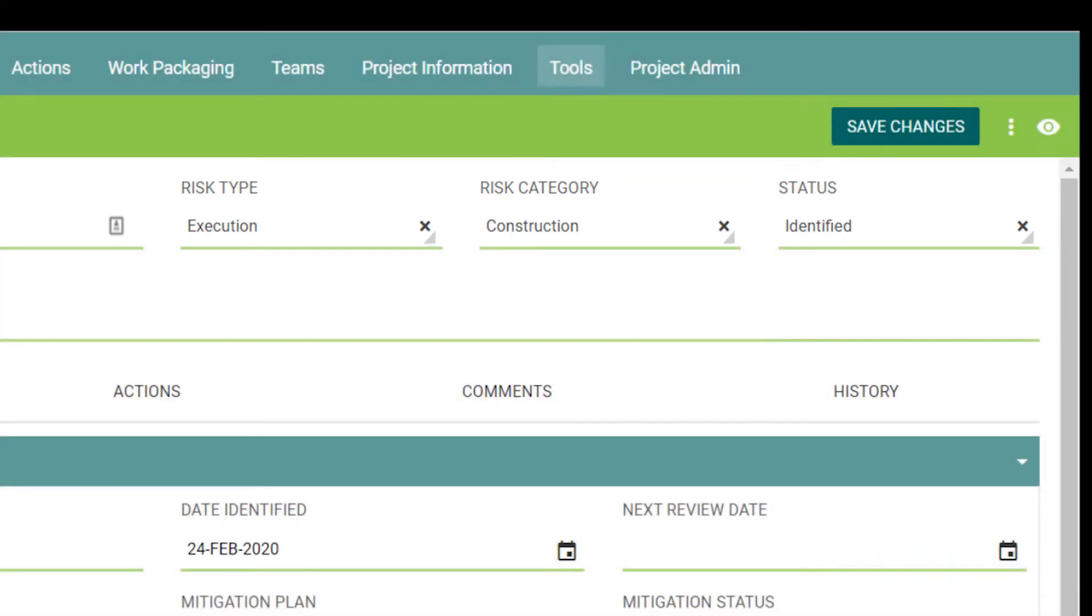The status is important because it differentiates between an event that has been identified as a potential risk versus an event that has actually occurred.